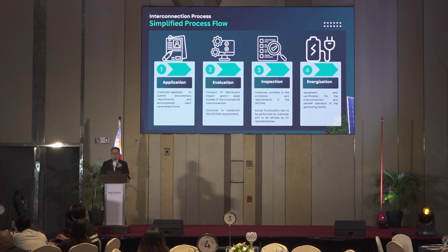And then for all 3, zero export, non-exporting DER, as well as embedded generations, the COC validity will be perpetual once given, until any material change in your facility is effected, such as if you upgrade your facility, or change your generators, or change your inverters. Okay, I have two more slides, so I'll just make it quick.